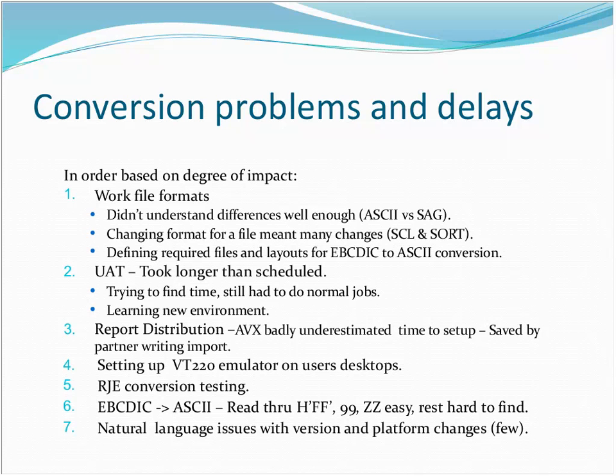Number 3 was the report distribution. Again, we had that concept where we did bursting, where we took the report and broke it up into little pieces. Well, we didn't really realize how much work it takes to define all of that bursting, and we didn't really schedule any time into the project to do that. Once we realized how long that was going to take, that was a big uh-oh, because that was weeks to months worth of work to set up all that bursting. That wasn't in the project, and as soon as we realized that, we thought, uh-oh, this is going to be the one that comes along and kills us, that's just going to wreck the whole schedule.